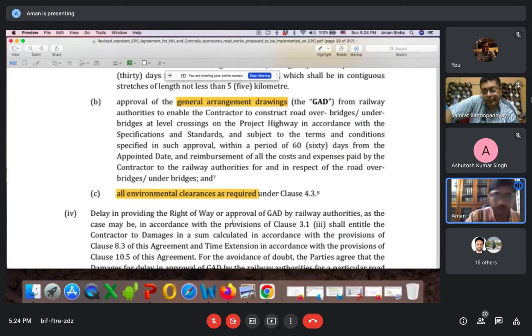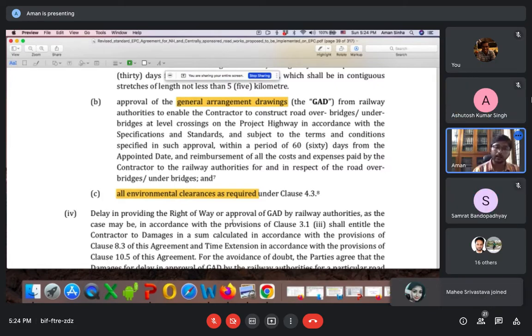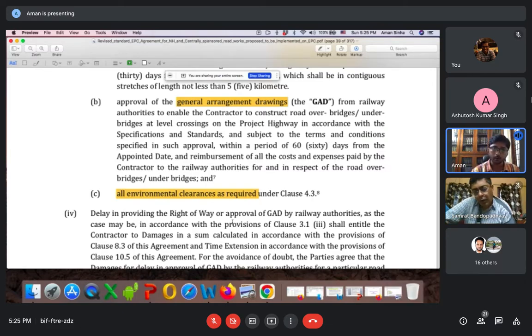Before telling you this, let me explain what is performance security. So performance security is that when, as a contractor, I have brought the plants, machineries, or the labor to the project area, the construction will begin. So in lieu of that, I, as a contractor, will be providing you a mobilization guarantee. And in lieu of that, the authority will pay the contractor, acknowledging that yes, this contractor is ready to work. He has all the capacity. He has brought the plants, machineries.